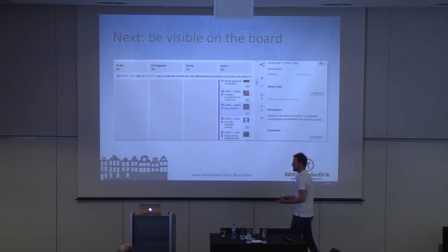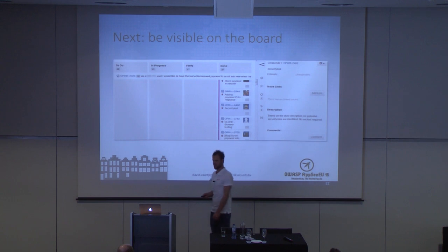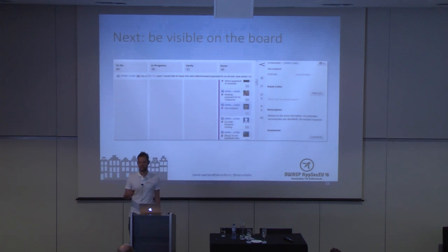If after half an hour of reviewing you still didn't know if it's security relevant, because it was a bunch of code which you can never review in half an hour, we just added a security story to it, saying it needed reviewing later on. Otherwise we could just close it, saying we checked it, or we see it's not required. So just be practical with this.